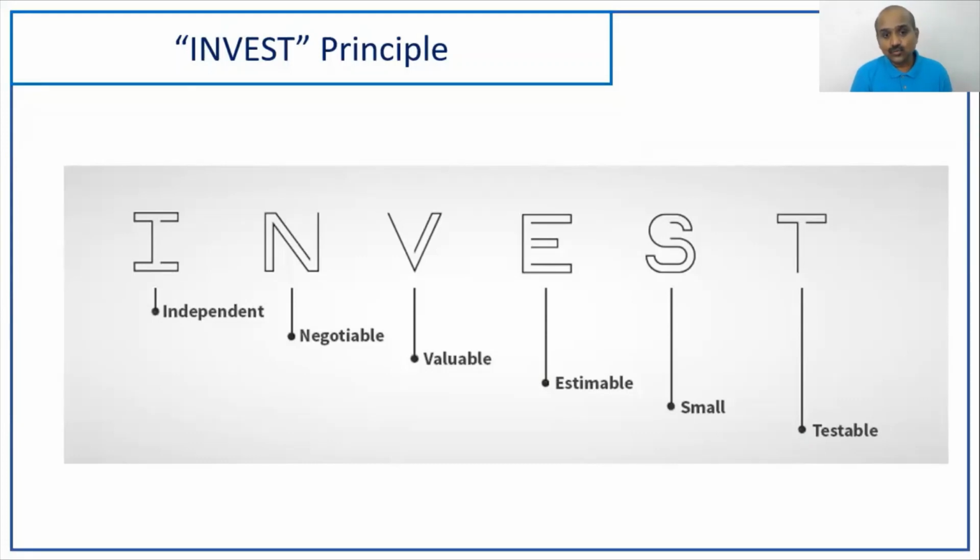And then the third one is valuable. Friends, I come across scenarios on the ground wherein the team says, I will complete development and unit testing required for the story in this sprint. But then what is the value business is getting out of it? You are working on development and unit testing for this user story. That means you are not completing the functional testing, regression testing, integration testing, and you're not deploying at least in a pre-production environment. So the product is not able to realize value.